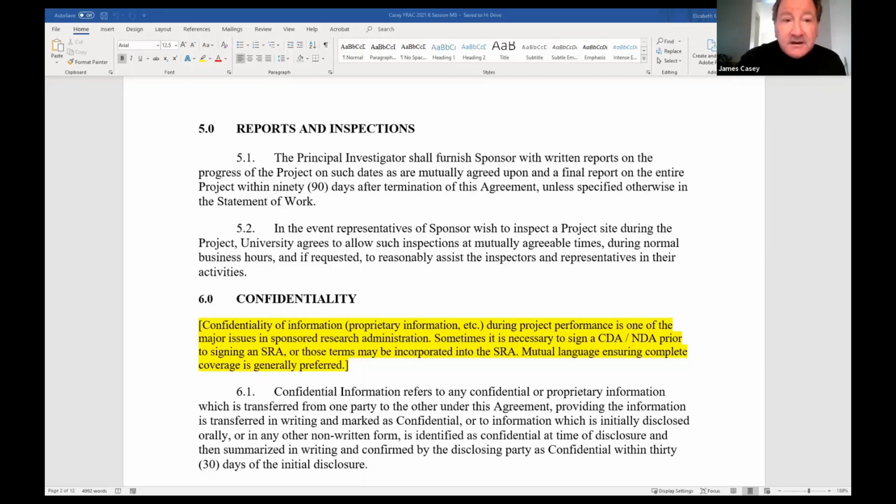But once again, if you are being detail oriented with the deliverables and the term of the project start and end dates, then you can easily map on paper or in an Excel spreadsheet when reports are due. Now, certainly in many sponsored research proposals, that is all laid out already, but that's not uniformly the case. And make sure you pay special attention to this.